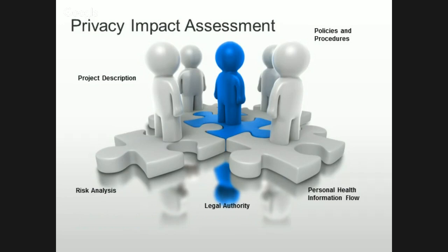You also want to start that PIAA process before a lot of these fine details have been finalized, because you are going to find things in your PIAA process that you want to have amended to the documents before you sign them. So a vendor for a privacy impact assessment, whether it be a computer network vendor or somebody who's providing outsourced healthcare services, or perhaps outsourced other types of technology, retention of documents, for example, those contracts need to have some key words that you're going to have from your privacy impact assessment and your legal authority.